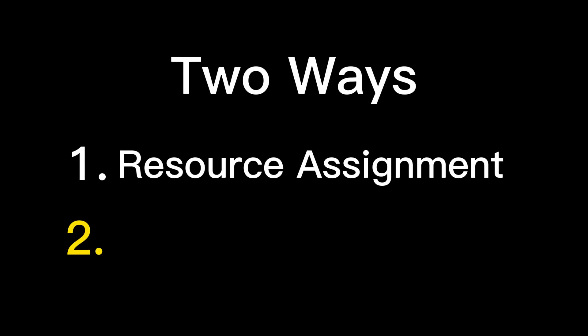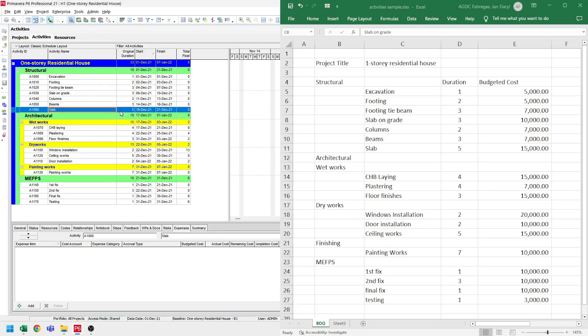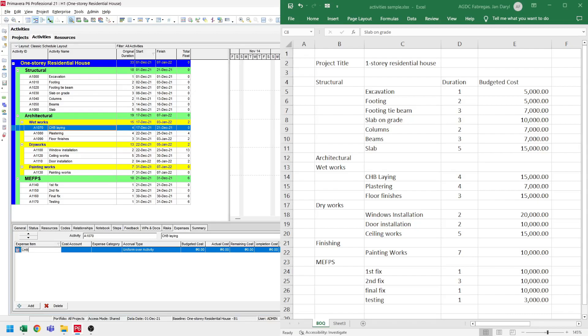Now another way to assign cost to each activity is through expenses. Let's try this for the rest of the activities. Select an activity. On the details pane below, select expenses. Click add, and we can name this as the activity name. Now for the budgeted cost, we refer to the BOQ. So for CHP lagging, we have $15,000, so let's set the budgeted cost to $15,000.